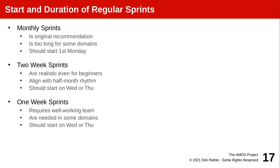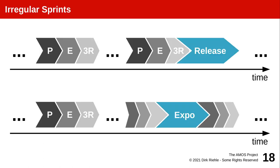You can have different durations: one week like in AMOS, or two weeks which is more common in industry, all the way to monthly sprints though those are less common these days. For shorter sprints, you should start and end in the middle of the week so that the learnings from finishing the sprint will be fresh in your mind as you start the new sprint. It's less of an issue if you have long-duration sprints. And then you adjust it to context, like that expo or fair coming up.